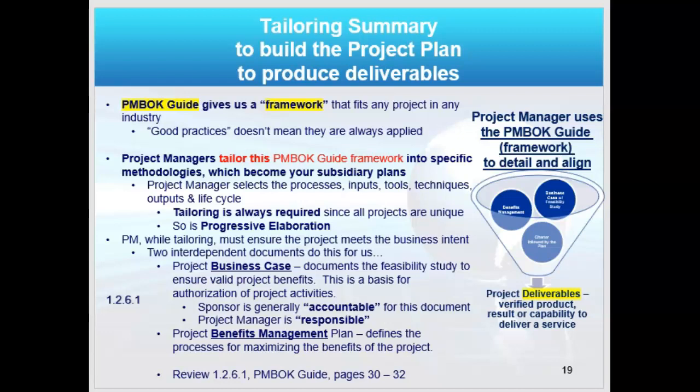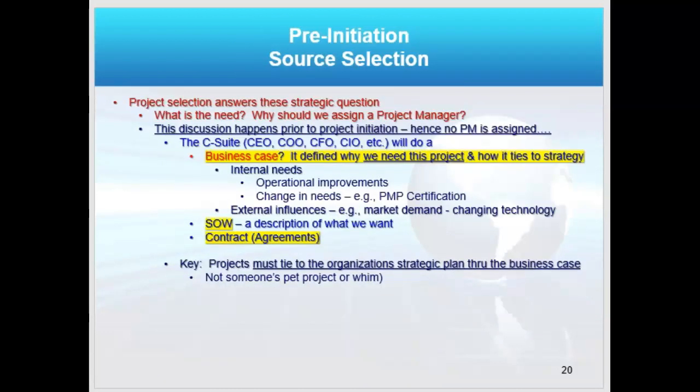There are two starting points in this tailoring process, in this framework process, and that's the business case and the benefits management plan. The business case defines the need of the project. These are the documents that discuss the feasibility of the study and the benefits that will be earned. Where the benefits management plan is going to define the maximum benefit that you expect to receive. So this is all pre-initiation of the IPECC, initiating, planning, executing, controlling, and closing.